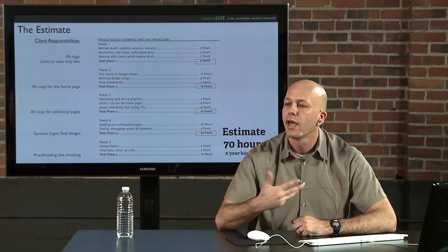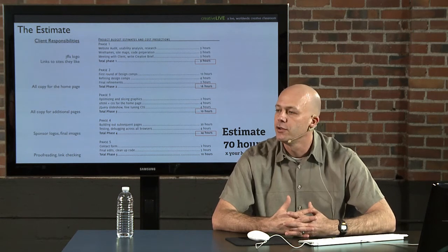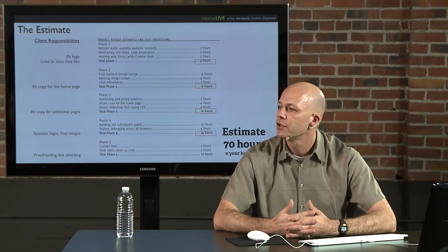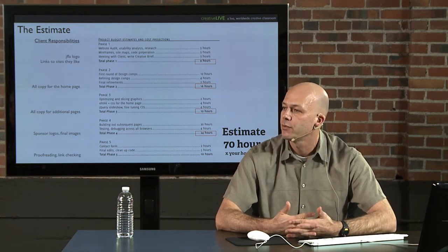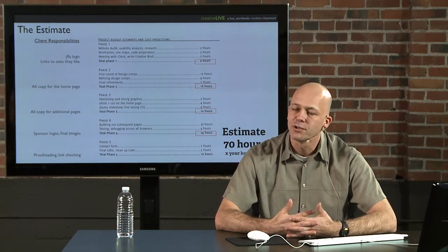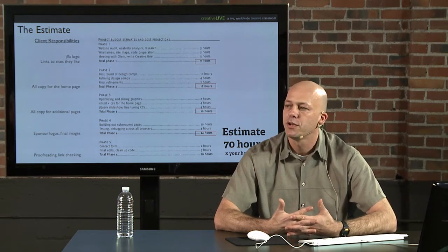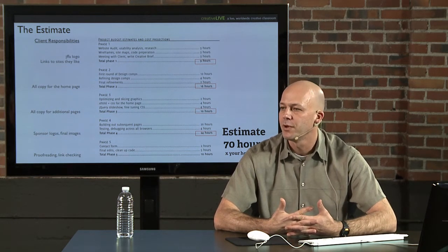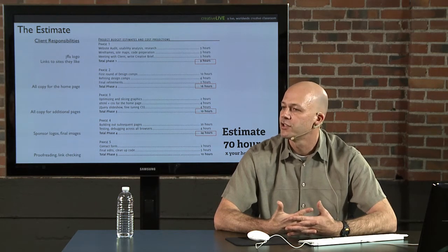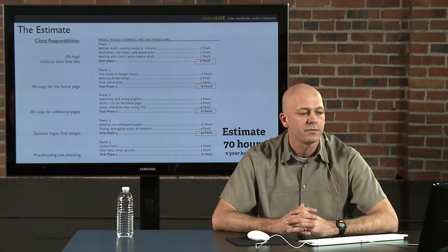you can either go by your estimate and somewhere in your contract, and I'm not going to get into this because I'm not a lawyer, you should say, this is my estimate, additional hours beyond my estimate are billed at my hourly rate. All of us have eaten a few hours along the way because we didn't want to offend the client, and some of us have frequently, or sometimes, finished the project early, come in on time and under budget, and pocketed a little change. I think that all balances out in the long run. Everyone has to make their own decisions how to handle those situations.